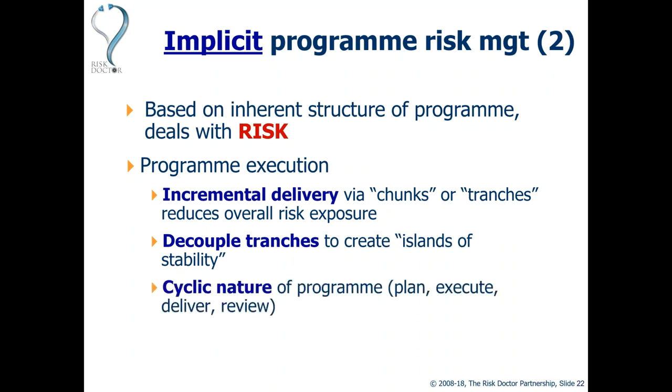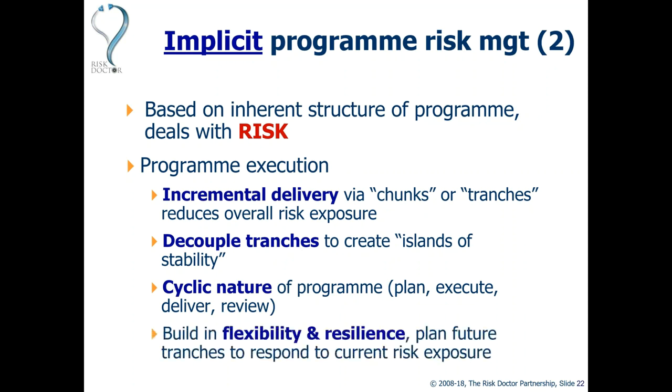Of course, this is based on the idea that programs are cyclic, that they have a plan, execute, deliver, review cycle, and so within that cyclic nature, the structure of the program itself de-risks the program so that we can manage the overall riskiness of the program as we go through the different cycles. Okay, so what we're doing here in this way of structuring the program in execution is to build flexibility and resilience into the way that the program is structured.